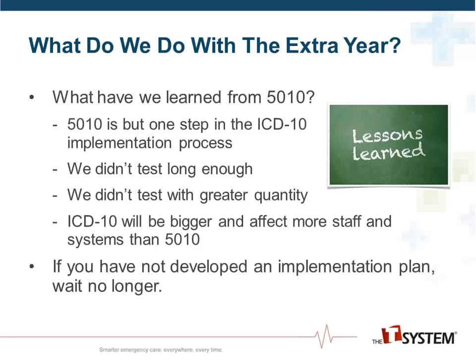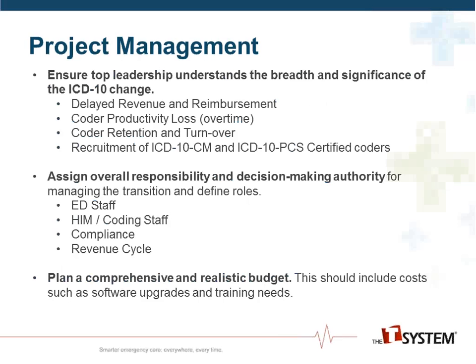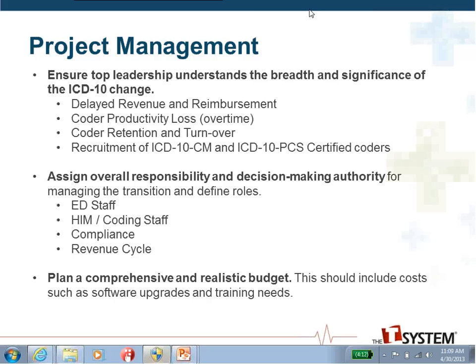The intent of extending the deadline was to allow facilities and providers additional time to develop implementation plans, and if they already had developed an implementation plan, to allow facilities and providers to have additional time to test with clearinghouses, vendors, and payers. If your organization has not developed an implementation plan, we hope that we are providing you with compelling reasons to do so now. The first step in creating an effective implementation plan is designating someone to coordinate this project across your organization. This individual should identify and engage all stakeholders immediately and develop a timeline.